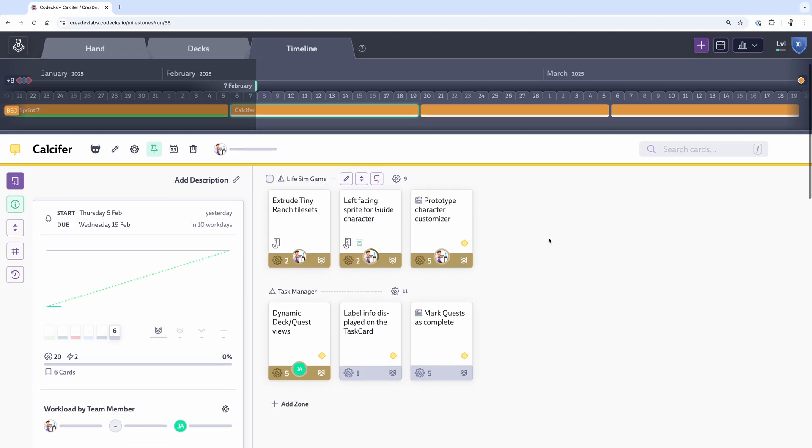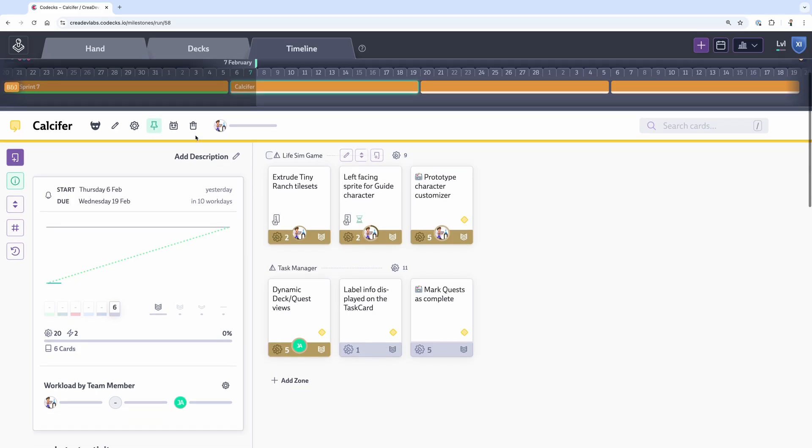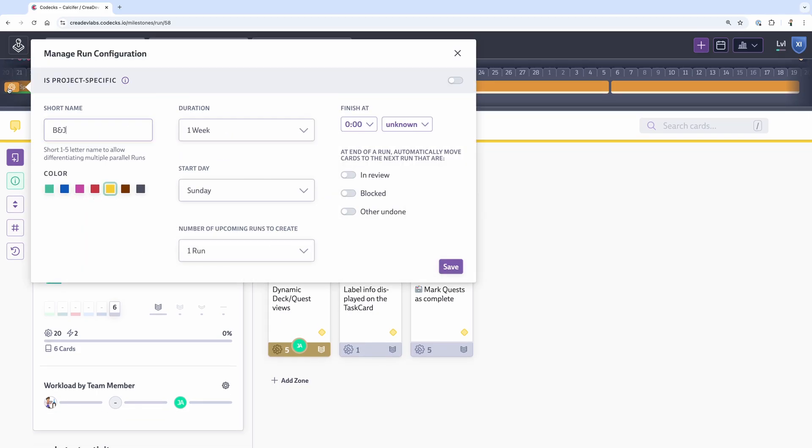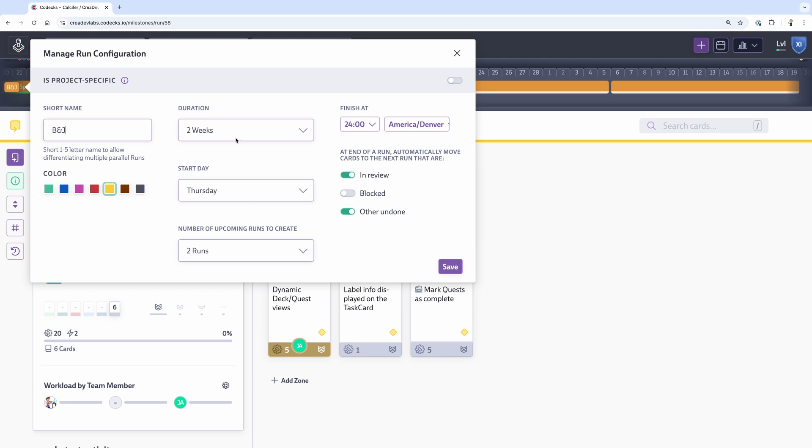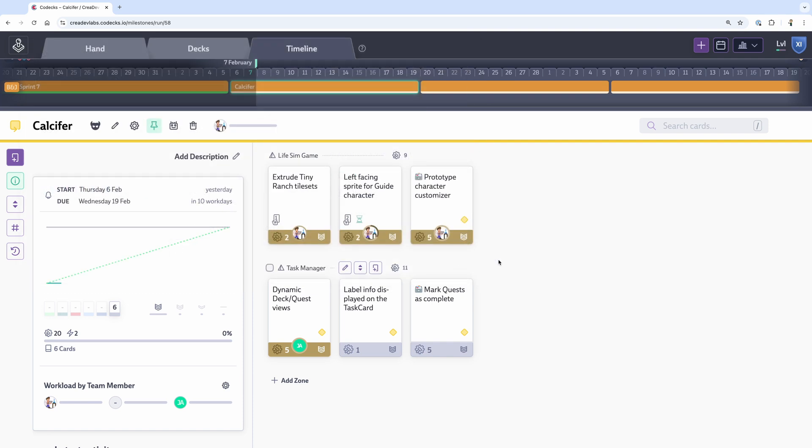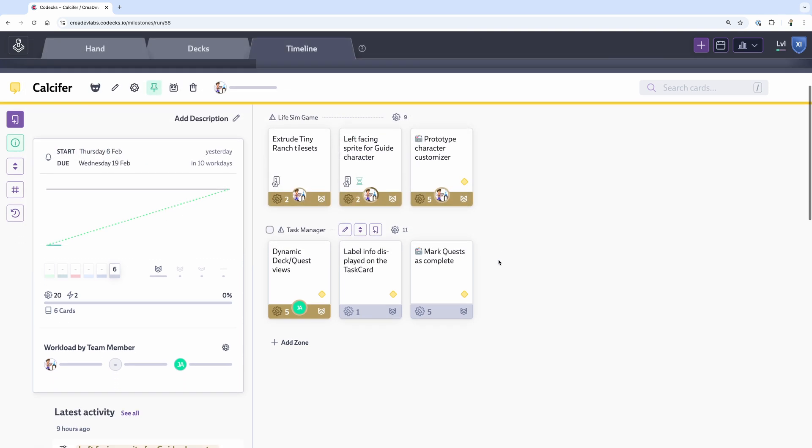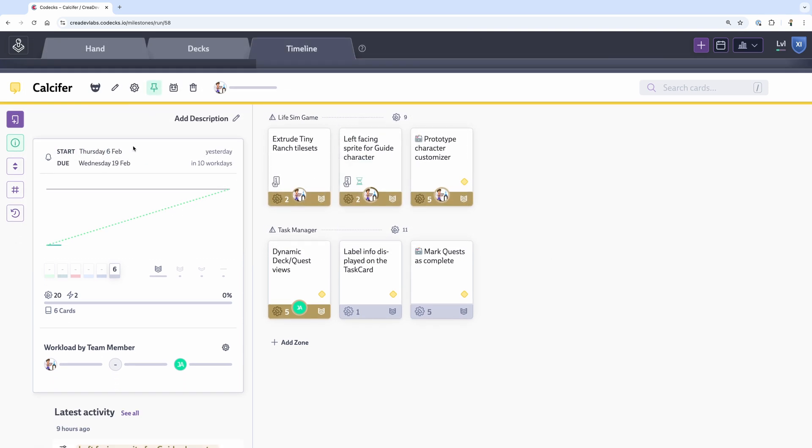At the beginning of a sprint, you have a planning meeting where you decide what tasks you're going to try and get done in the next two weeks. The goal then becomes completing all of those tasks within the two weeks. If you find you loaded your sprint with too much work, in the next sprint planning, you can adjust how much work you want to include in the next one.